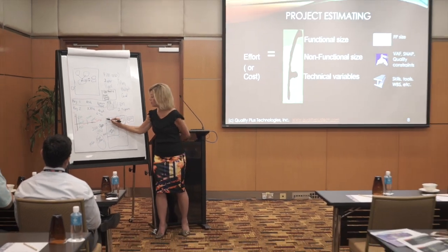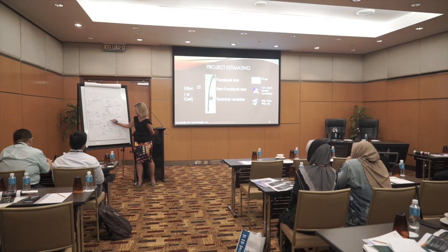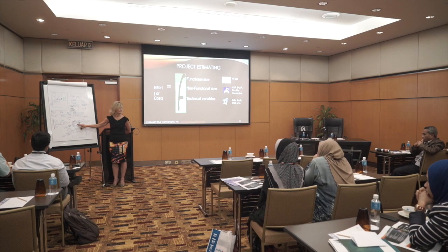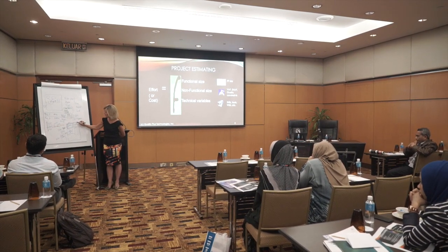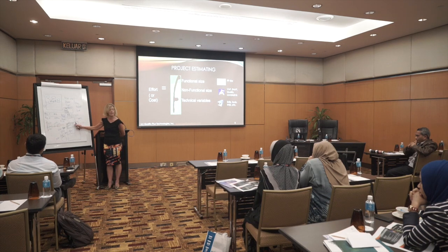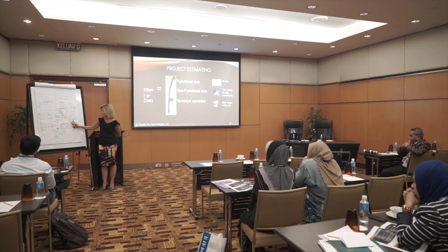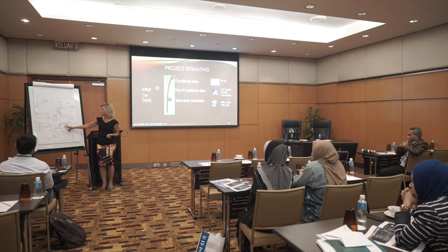So you deliver the reporting piece, and we've agreed that is 200. Now you get $200,000. Then you deliver the next piece, and that's also 200. So now you get another $200,000. We've agreed in advance. Oh, now there's some changes. Yikes. Okay, we don't want those reports. We actually want some different reports. What are we going to do now?